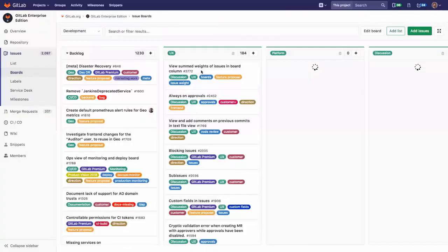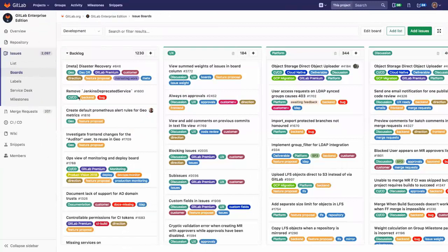That agile principle of having your big visible charts and tracking mechanisms for any given project is in the system. You can create one board or many boards. These boards allow you to create workflows for your teams, much in the manner of a Kanban board or a Scrum board, to track their work, whether through a project or through a single iteration. From a Kanban perspective, you can use a pull method for working through items.